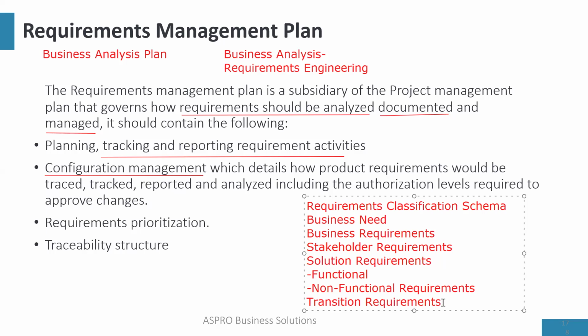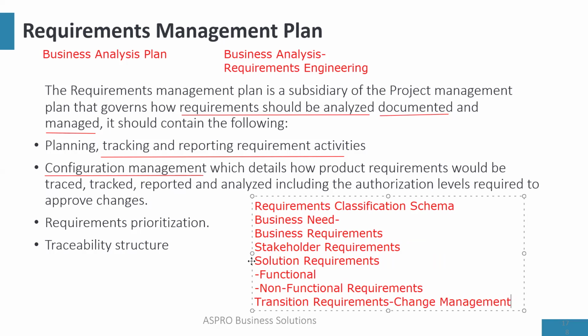So, transition requirements is where we talk about change management, right? Now, what's change management? You are modernizing a petrol station. That's a change. What do you need to get ready for the change? Imagine your staff who know how to use the analog pumps don't know how to use the modern pumps.